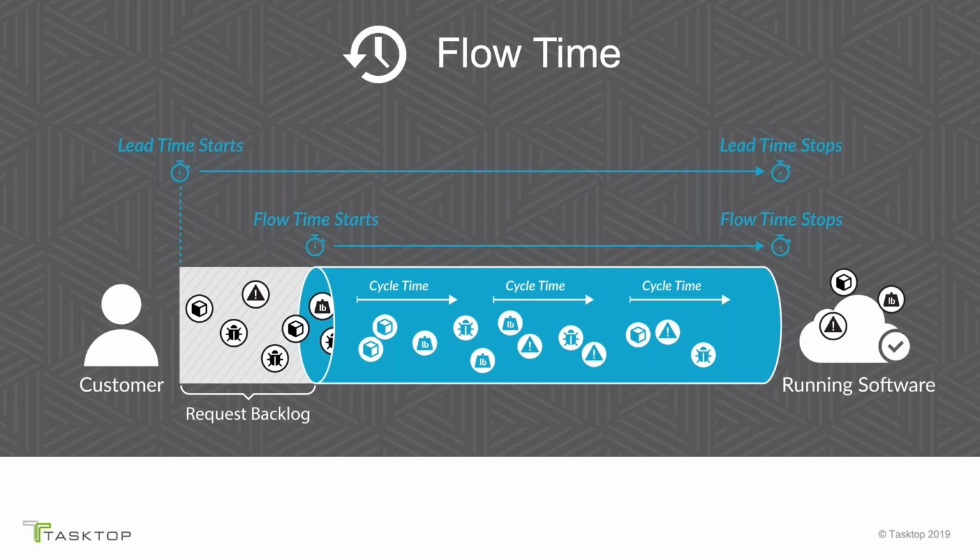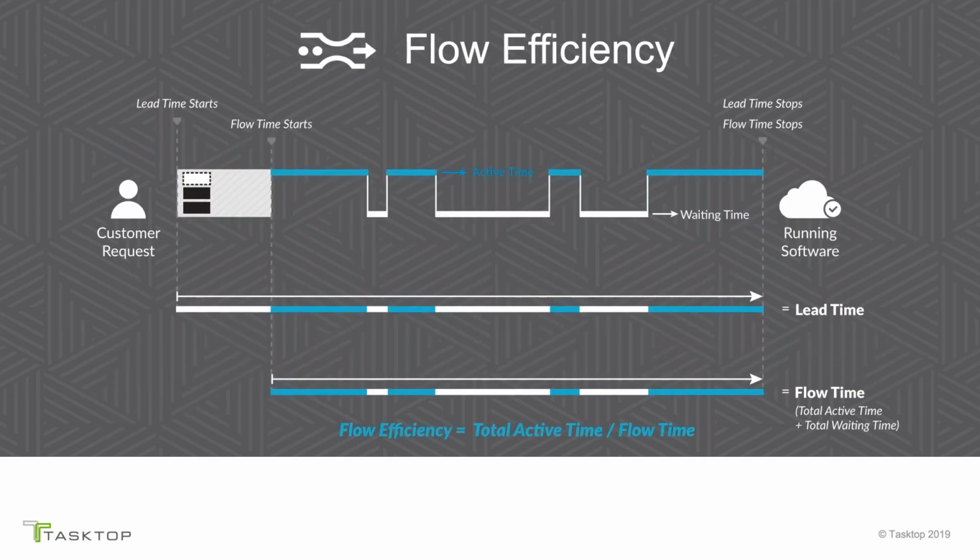If you do value stream architecture and value stream management, you know across all of your tool sets how this feature is kind of working. And if you can map it to your different tools, they have many different wait states, not just wait states, but statuses. Sometimes you're working on a bug, sometimes you're working on a feature, sometimes it's waiting for someone to review it or approve it, or someone to test it, or someone to release it. So there's active time and waiting time.